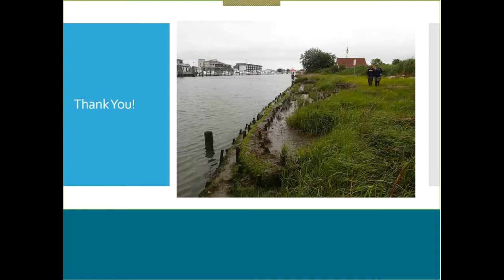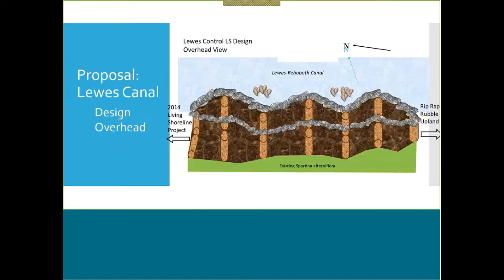Okay, so just before you actually submit the application, that agreement would have to be included in the application packet, showing that you have permission from the landowner to conduct the activity and access, and all that type of information. Right. And then the other question that I had, if you can go back to your plan view of the process on the slides. Was that a conceptual plan, or is that the plan that you were intending on submitting for the application? I would probably put a little more on there, but overall, yes.